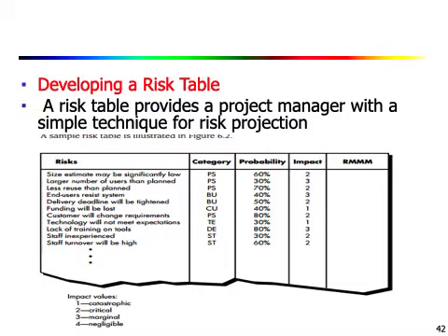In the third column you have the probability of occurrence of each risk. So the probability of occurrence of each risk is entered in the third column, and the probability value of each risk can be estimated by the team members individually, and the individual team members are polled in round robin fashion until their assessment of risk probability begins to converge.